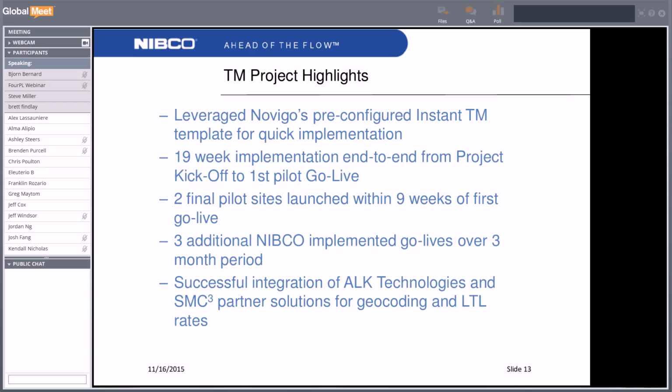From the project kickoff to the first site go live, we were able to complete our implementation in 19 weeks, which enabled NIBCO to begin realizing benefit and payback in a shorter period of time. Our two final pilot sites were included in the initial setup of the system, so there was not any configuration work that needed to be done by NIBCO to bring these facilities up on the system.